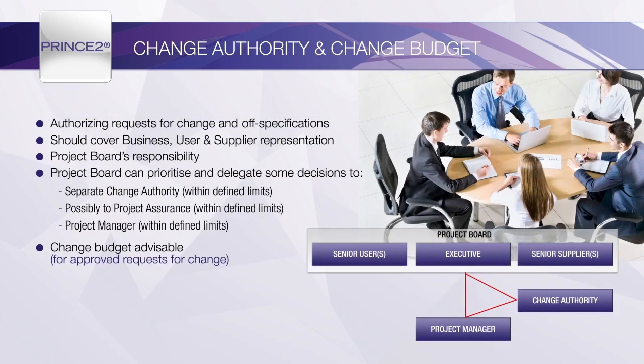If a change authority is to be carried out by someone other than the project board, then it is advisable to put some restrictions on the decision-making, such as the amount of changes allowed during any one management stage, or the amount of funding allowed for any one change. Such decisions and guidance should be documented in the change control approach.